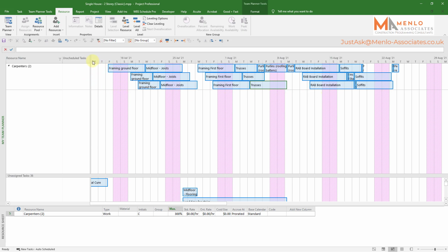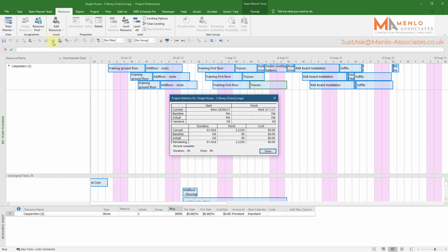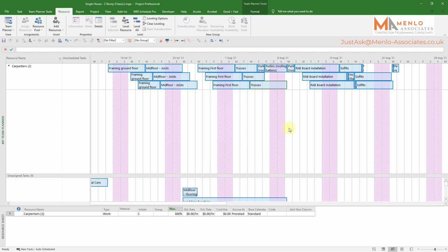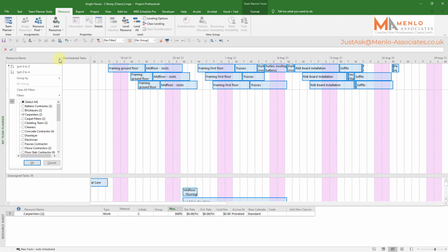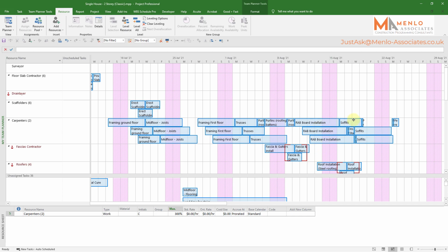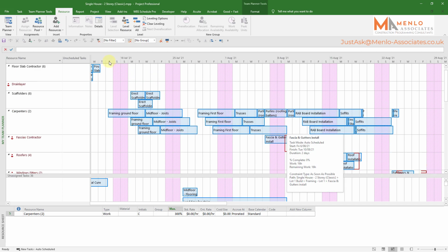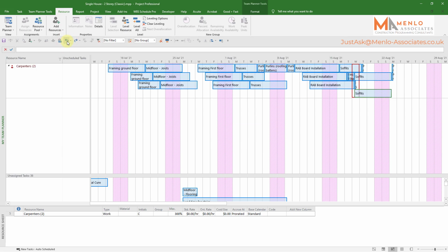Now, if we look at this, you can see the work we've done. It hasn't actually altered anything on my critical path at this point, because obviously these jobs have an amount of slack and I'm moving within the amount of slack. But if we look at the whole job in one hit, I'm just going to push these back and undo the changes I made there.